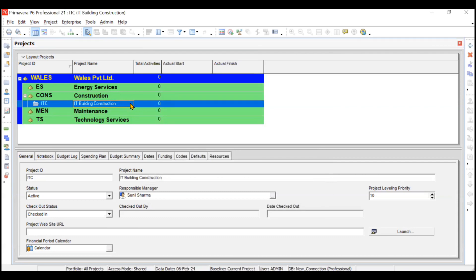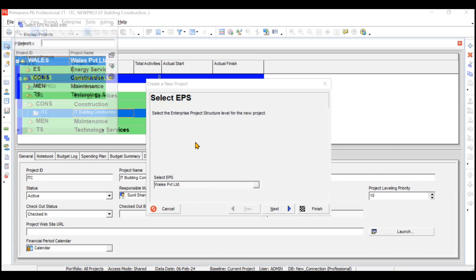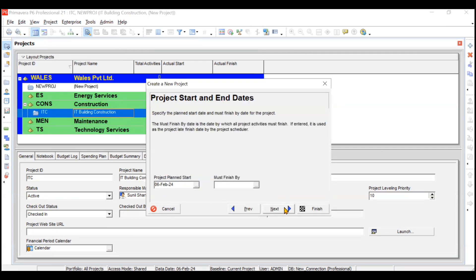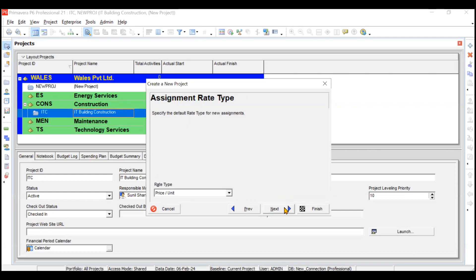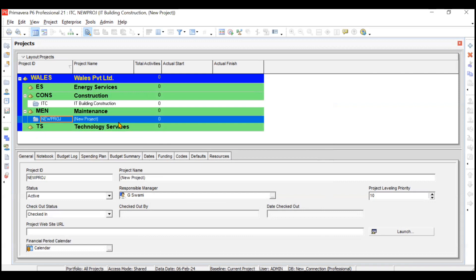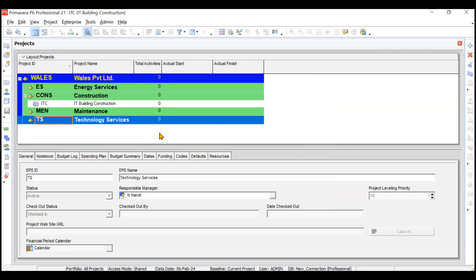If you want to create a project another way, from the directory bar you can click the New button and it will create a new project. You'll select the EPS - say Maintenance this time - click Next, give the ID and name, click Next, choose a start date, click Next, assign the responsible manager, click Next and Finish. The project has been created under Maintenance. We didn't want this project so we'll delete it by clicking the cross button in the command bar. The project has been deleted.